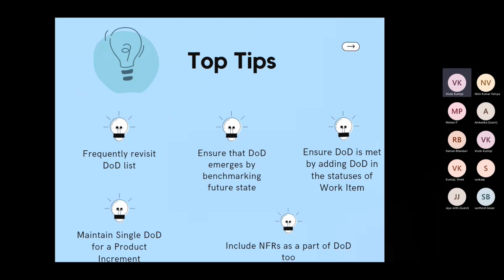There are different statuses for that user story in a tool, right? Different statuses for that work item. For example, just to give you the context, whenever a user story is open, it is in new status. Then it goes to open or active, then in progress, then maybe testing, then closed. Basically the life cycle of a work item.